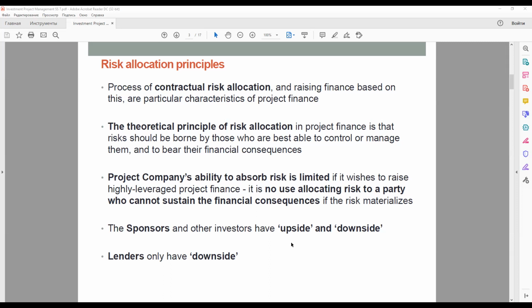Almost any risk can be transferred at a price, but if the contracting authority tries to push risk onto the shoulders of the project company, which the latter cannot easily manage, the project company will include a large safety margin to cover such risk in contract payment proposals. Paying for this safety margin may be a wasted expense for the contracting authority, and so it may be better value for money for the contracting authority to retain this risk itself.